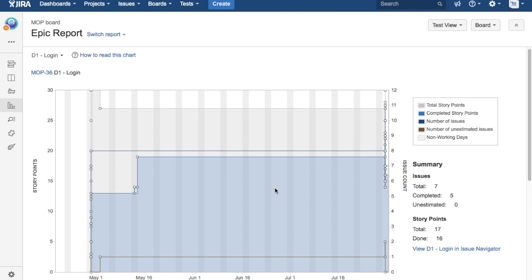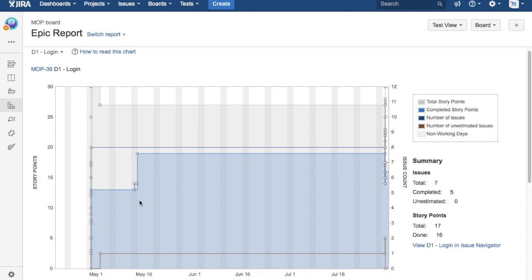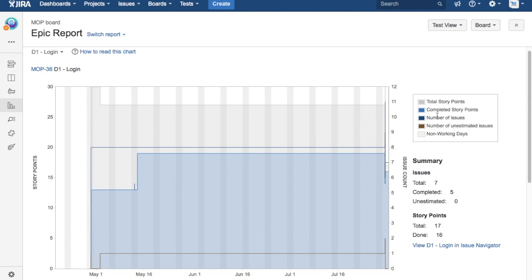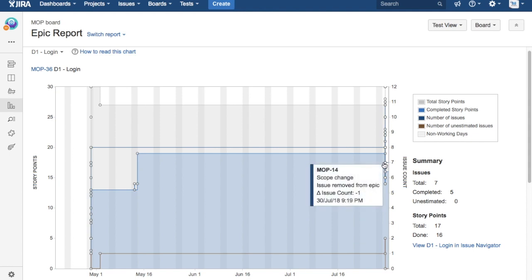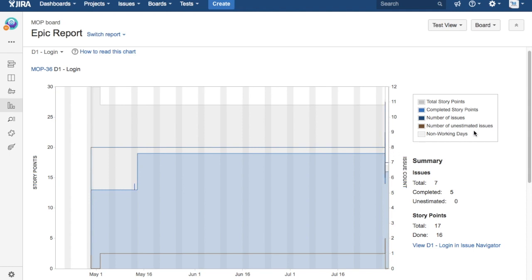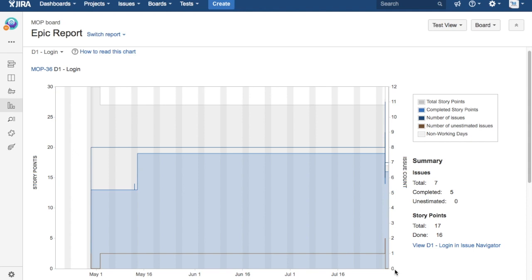In the ideal scenario, you will see that the completed story points will go up, and the number of issues will also progress because your number of issues will be closed more and more as the time progresses within the sprint. The number of unestimated issues should come down. Towards the completion of an epic, there shouldn't be any unestimated issues and all the issues or story points should be completed for the epic to mark that epic as completed.